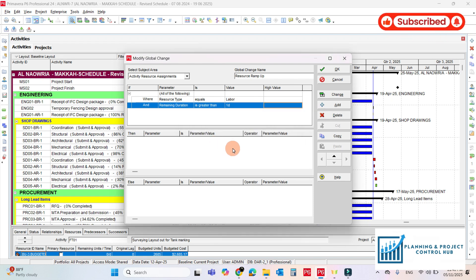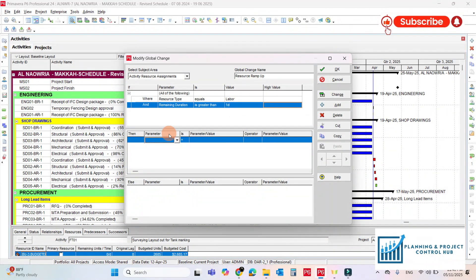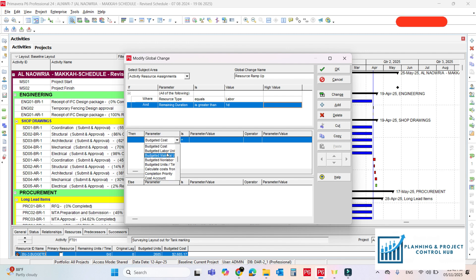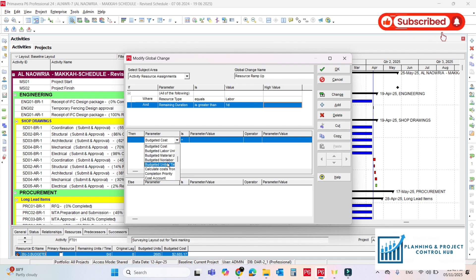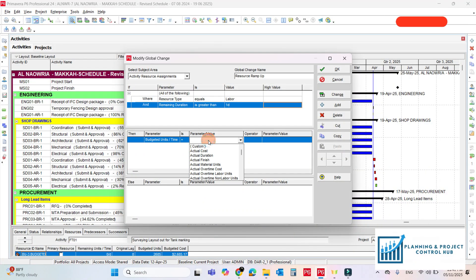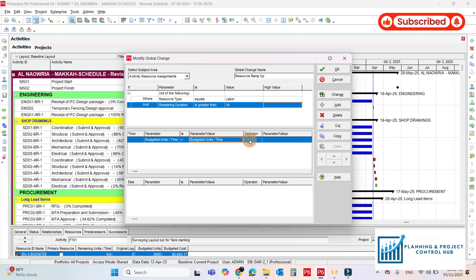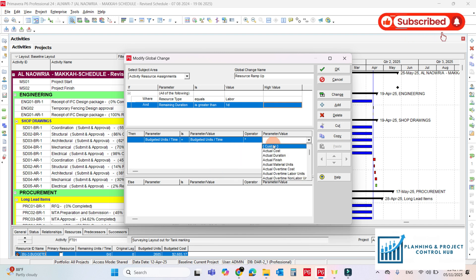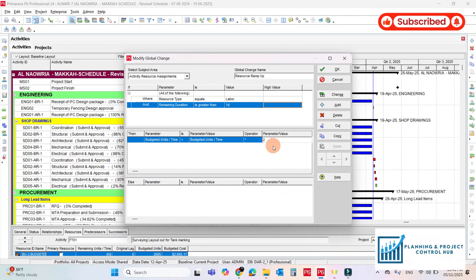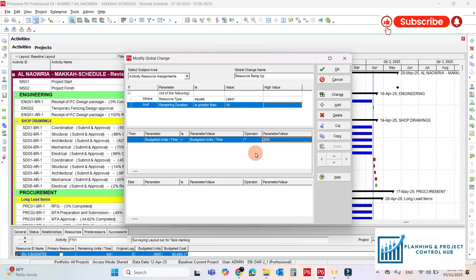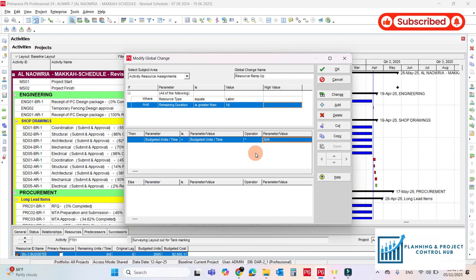And add the result here. What you want add here. So I need budgeted units per time is equal to budgeted units per time. Use the operator. That should be multiply by 2.